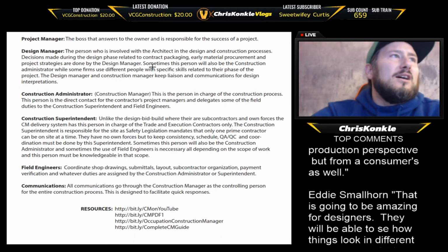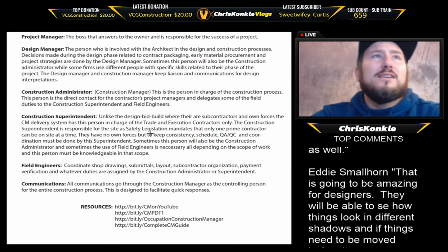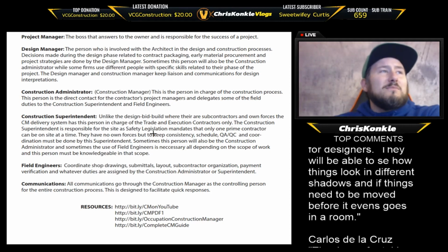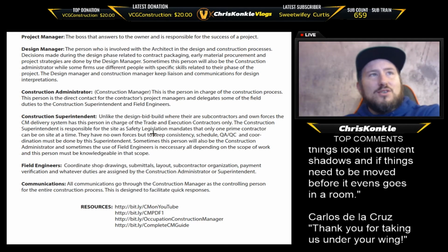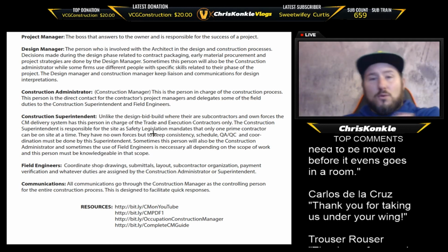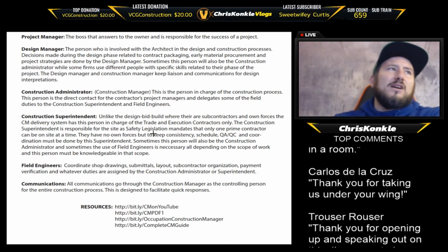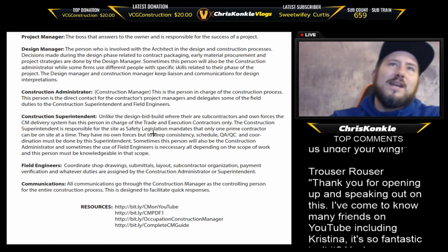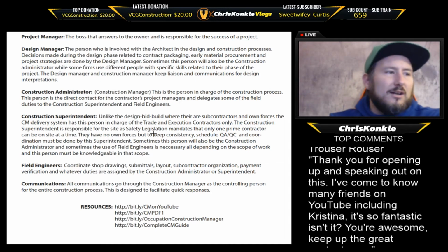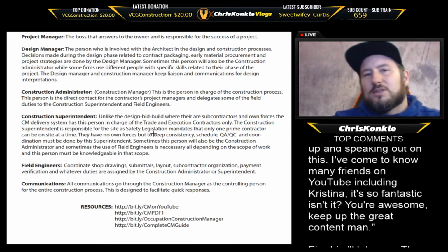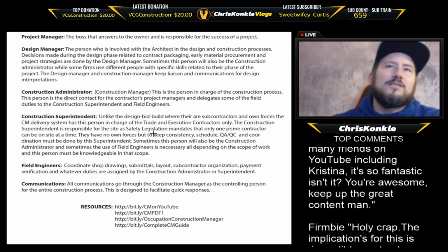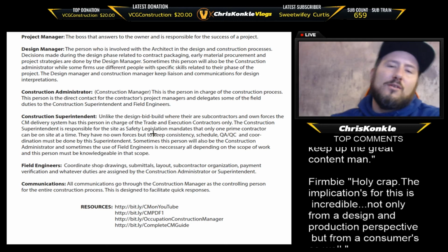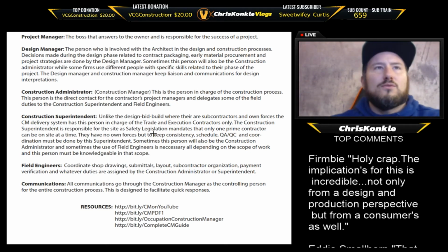The construction superintendent, so unlike the design bid build where they're subcontractors and own forces, the construction management delivery system has this person in charge of trade and execution contractors only, right? So that's a lot different, right? So they're there to coordinate. They're there for QA QC, make sure everything's on schedule and everything's compliant with the contract documents. So they'll also use the field engineers and stuff like that to help them out, right?